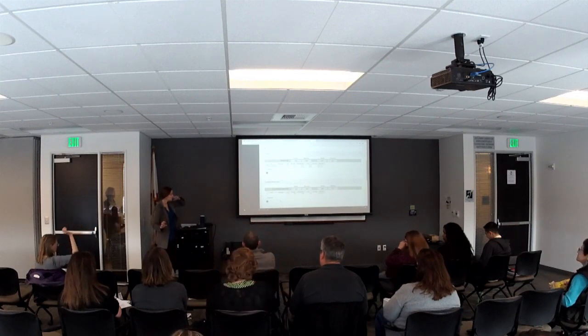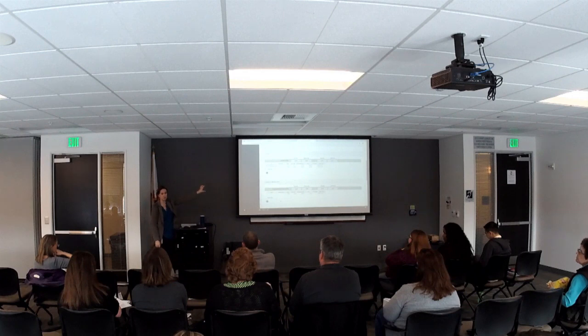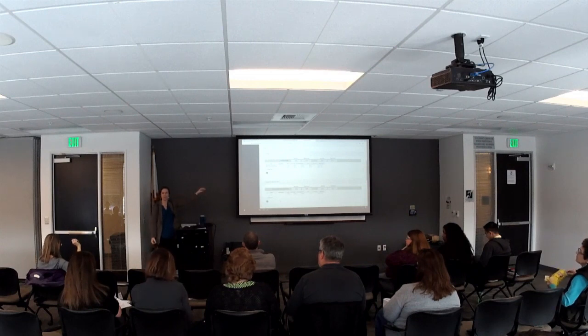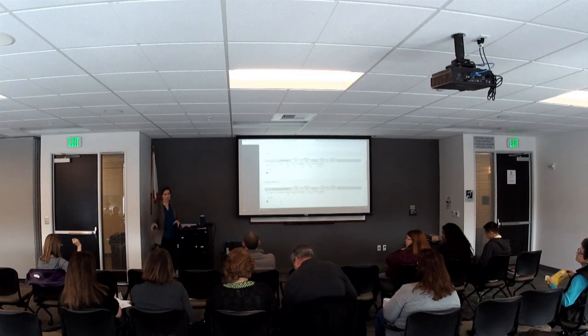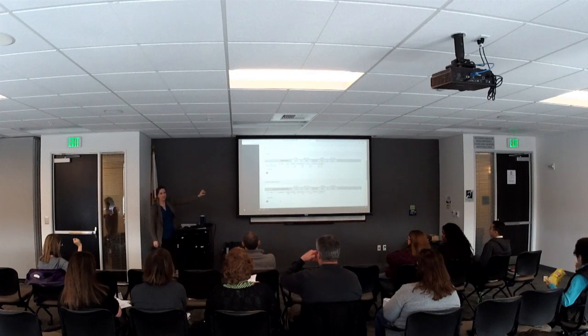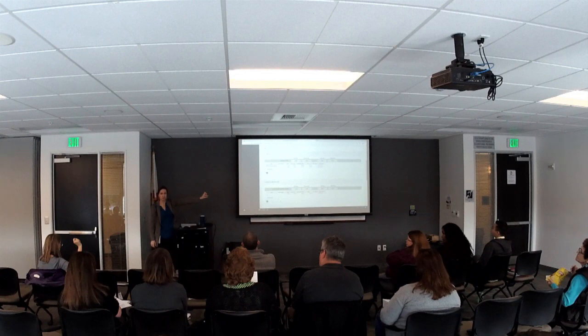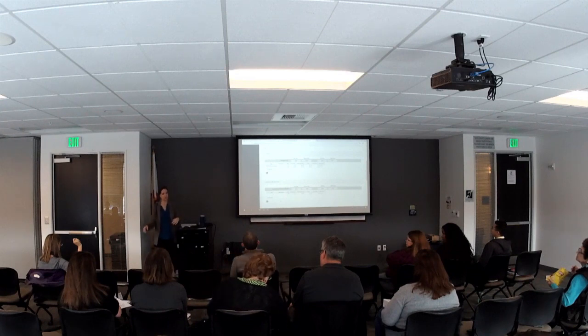I will say, when you go in to do your funds requests, you pull off of this budget, so it might make your life a little more interesting if you've got it super delineated. I would also say if you've got a consultant contract and that consultant contract is all GA, I would set up a GA line item that says consultant contract and put the not to exceed of the consultant contract in there, and then another GA line item that says staff costs. That will make it easier when you go to do your funds request, because you'll have your invoices and your documentation and it'll all line up.